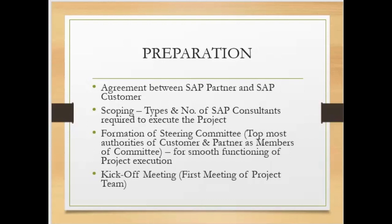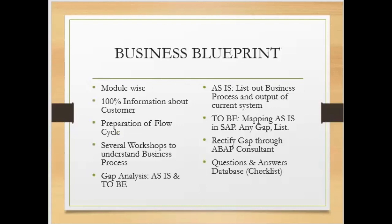Once the steering committee is formed, we go for the global mobilization process — bringing all team members onto one platform to start the project. After mobilization, we conduct the kickoff meeting. With that, the Preparation phase is complete: we defined the scope, formed the steering committee, created the team, and started the project. The second phase is the Business Blueprint phase.